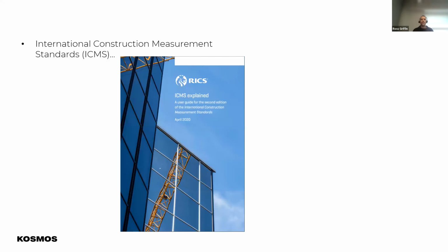So, as we mentioned before, ICMS is now becoming mandated, if you like, from the 1st of January. ICMS will be the reporting structure that you should use. The SCSI, along with their partners, have mapped ICMS to the national standards, and it'll be mapped to ARM as well, ARM 4/5 when it comes out. Suddenly we have two different reporting or cost structure standards, this ICMS and the National Building Standards. I would say that one needs to go.